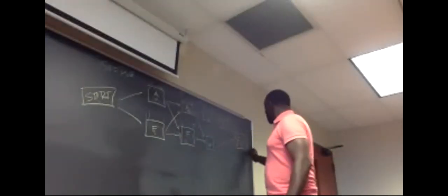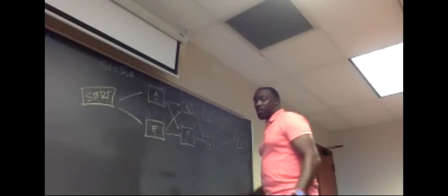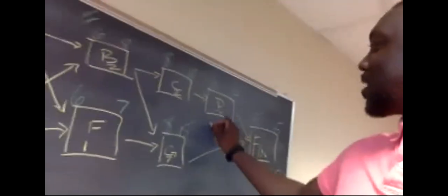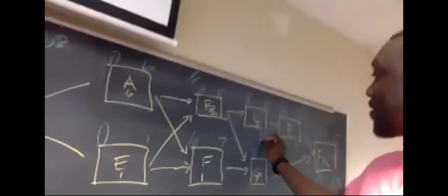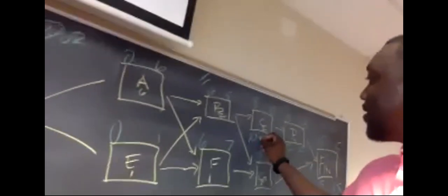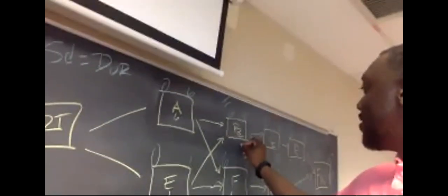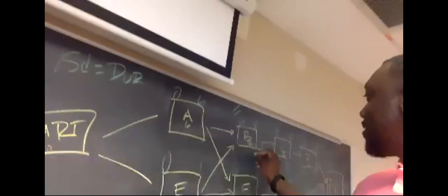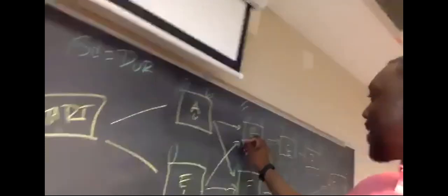So let's go backwards. 15s all the way around the finish box. Let's go with this top one. 15 minus 3, 12. I bring my 12 over. 12 minus 2, 10. I bring my 10 over. All right. 10 minus 2, 8.